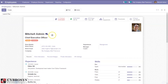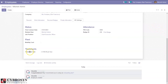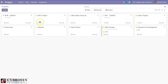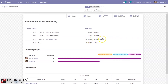To find the timesheet cost per hour setting, go to the employee form. Under the HR settings tab, you can find the option to set timesheet cost per hour for the employee. According to that value and the time spent by the employee on the task, the timesheet cost is calculated — this timesheet cost is actually an expense for the company. Profitability is calculated by adding total amount invoiced, total amount to invoice, and the timesheet cost.